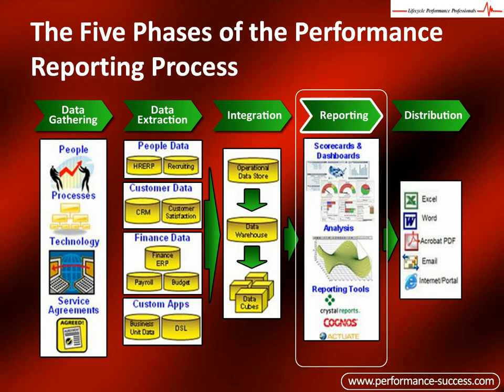The reporting phase allows companies and organizations to gain a better understanding of their business by providing critical information to employees, managers, partners, and customers. Performance reporting provides information against everything from metrics, scope, schedule, cost, risk, procurement, and quality. Performance reports are presentations and documents that summarize work performance information in the form of bar charts, S-curves, histograms, tables, and more.